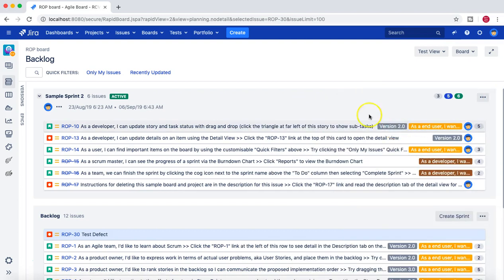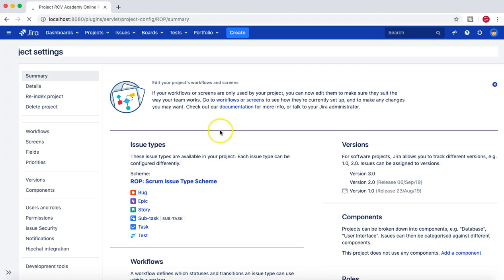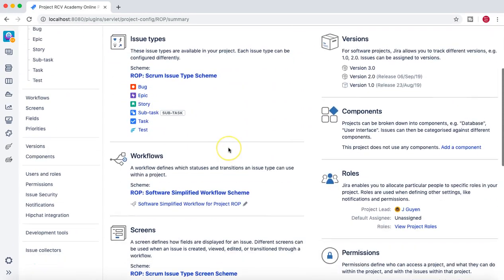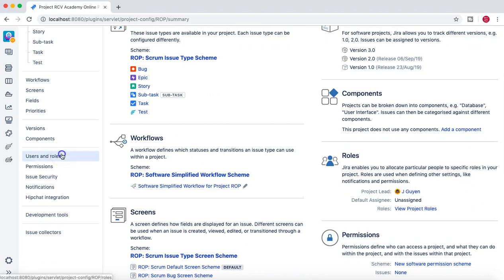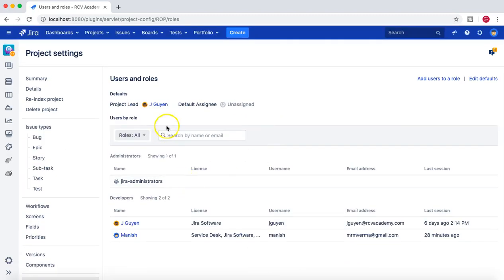However, as a project administrator or as a Jira administrator, you can change this default assignee to be someone — for example, a project lead or a component lead. You can choose who needs to be assigned in case a person doesn't choose any assignee for a particular issue type. If we go to the project settings, in the summary page or the users and roles page, you can see this information.